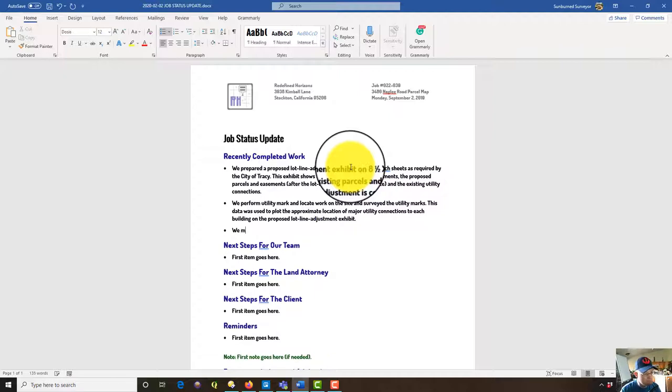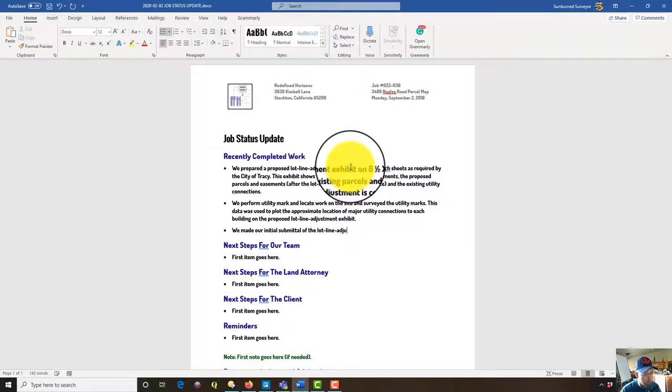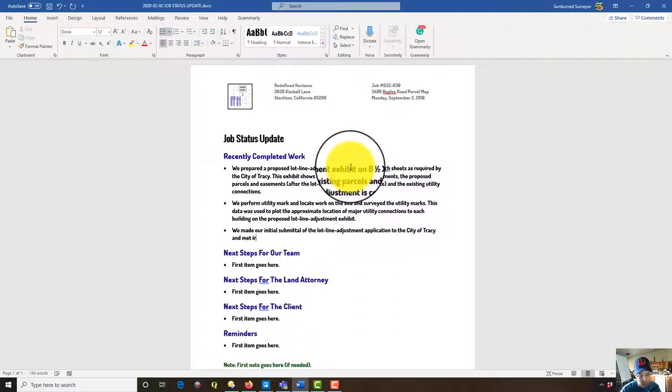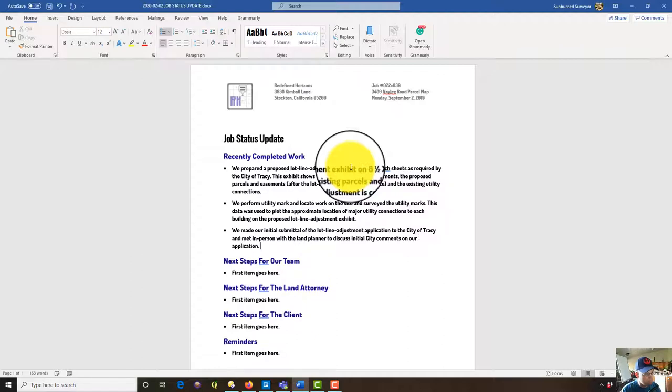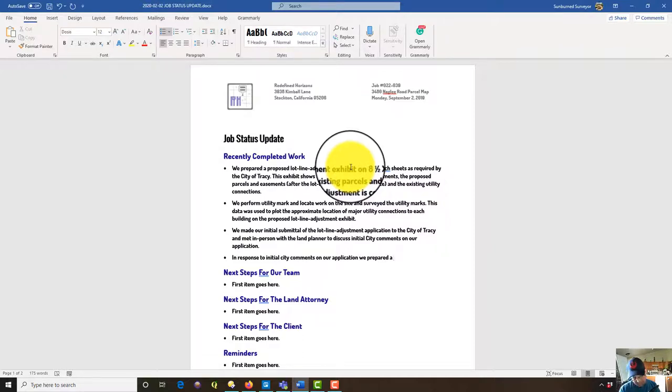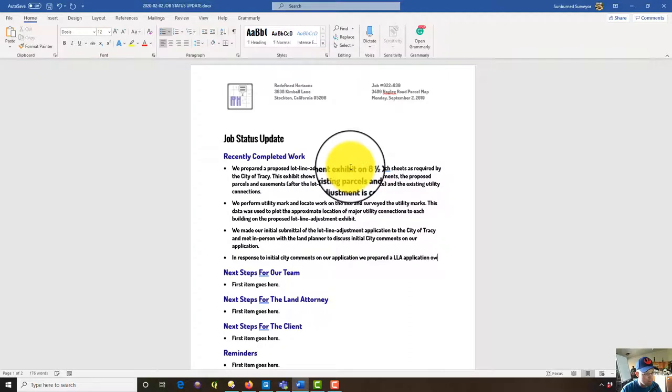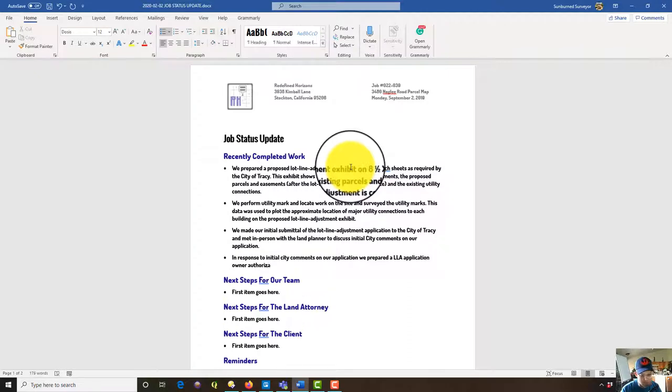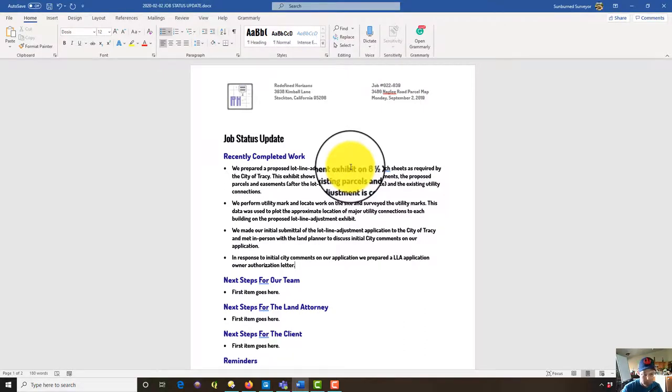And we're going to say, we performed utility mark and locate work on the site and surveyed the utility marks. So this data was used to plot the approximate location of major utility connections to each building on the proposed plotline. We made our initial submittal of the lotline adjustment application to the city of Tracy and met in person with the land planner to discuss initial city comments on our application. In response to initial city comments on our application, we prepared a LLA application owner authorization letter. So that's something extra that the city asked us to do.